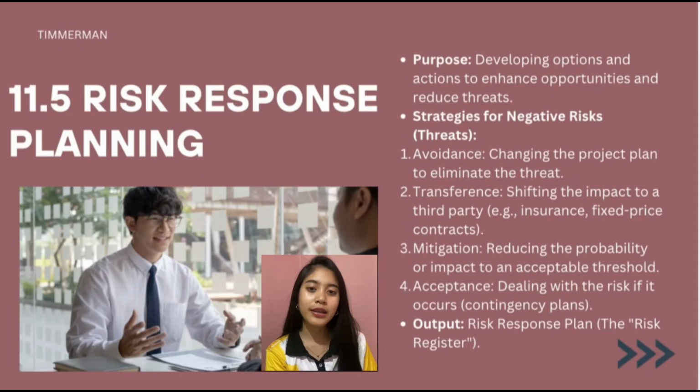The first one is avoidance. So changing the project plan to completely eliminate the threat, and this involves modifying the scope, adjusting the schedule, or choosing a different approach so that the risk no longer exists.